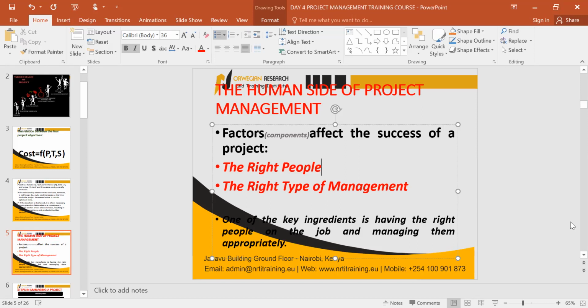There are those emergencies. And during the planning, we must be able to plan for such emergencies and how you'll handle them, which means you have some standby people. During the time that you are recruiting, you'll have some excess to cover replacement for such emergencies. We want things to run the way we planned.